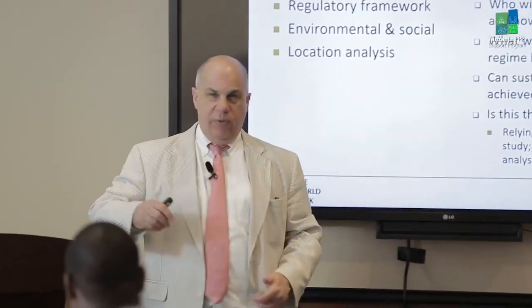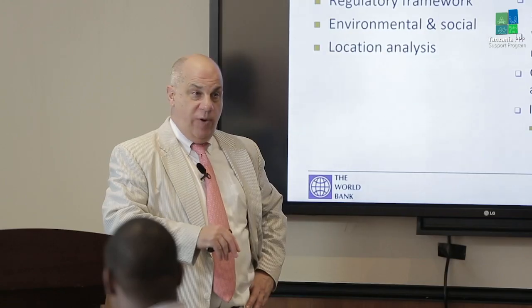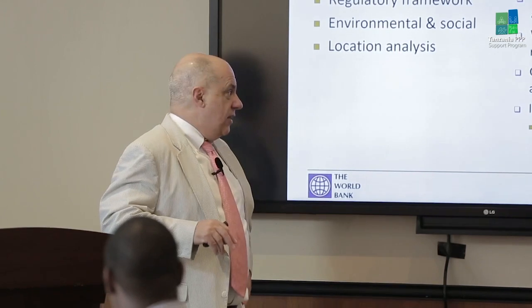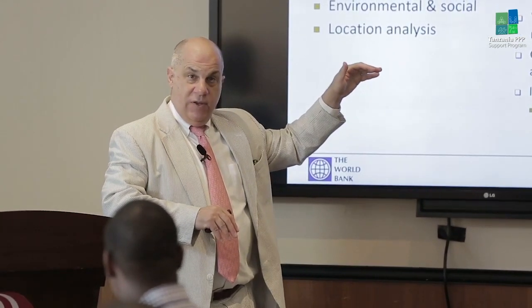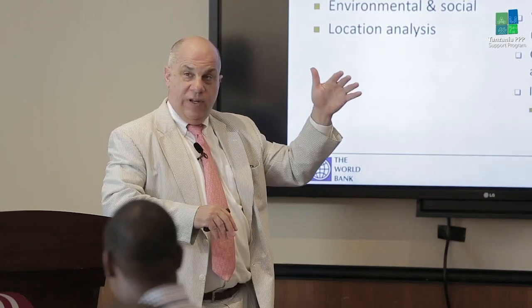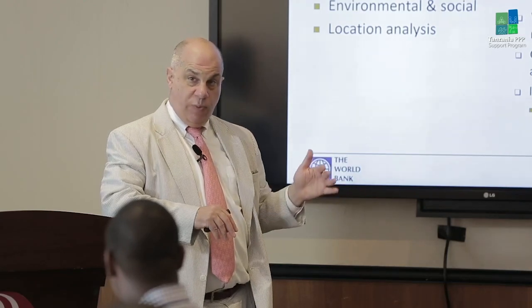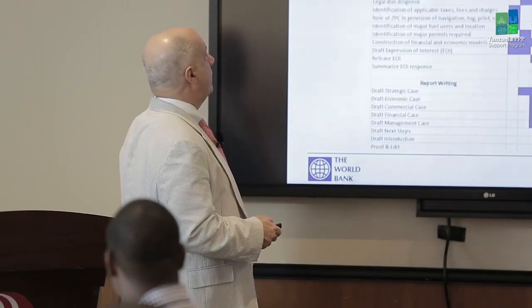Are we at the right location? When we did the pre-feasibility work, which is what this is, we did not have a study in existence for a bulk liquids terminal. What we had was, there had been a study for the relocation of the container port. And the container port study kind of showed Bumbwini as being ideal. We still had to ask the question, okay, that might be really good for a container port, but does it make sense for a fuel port? Two different things. It looked like it did, by the way.